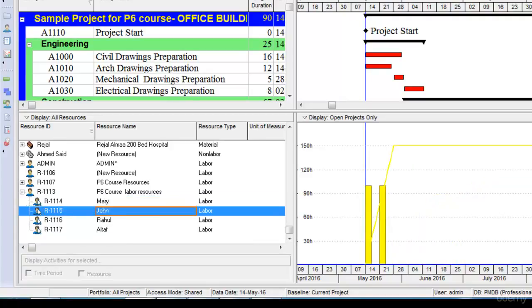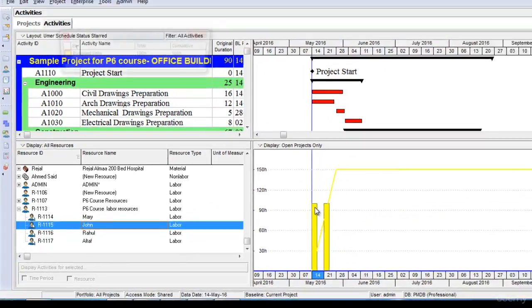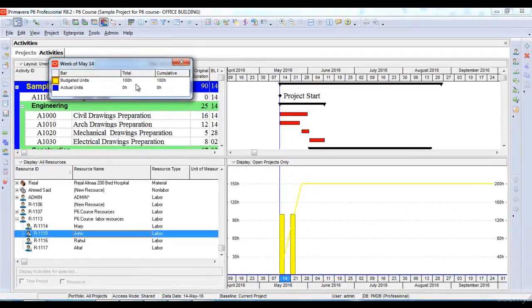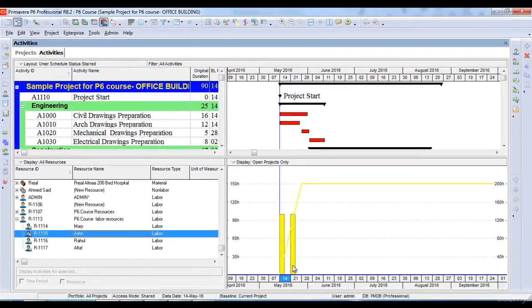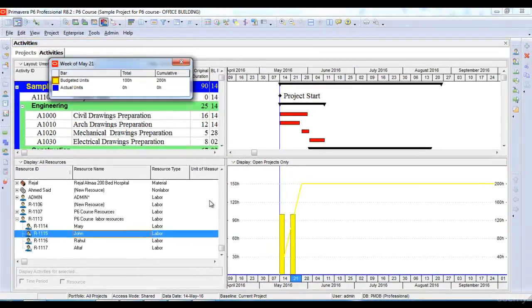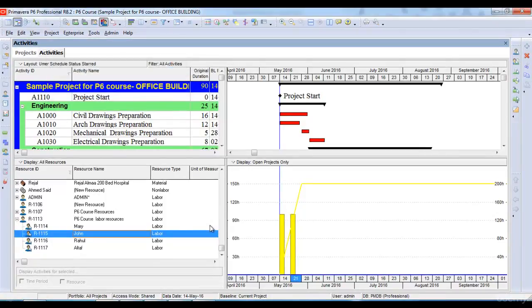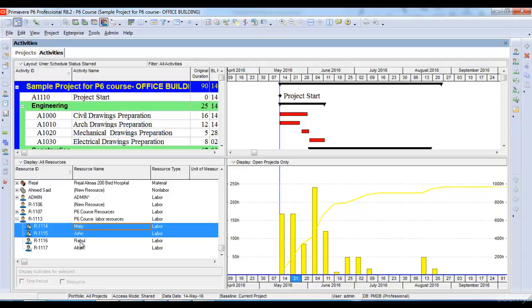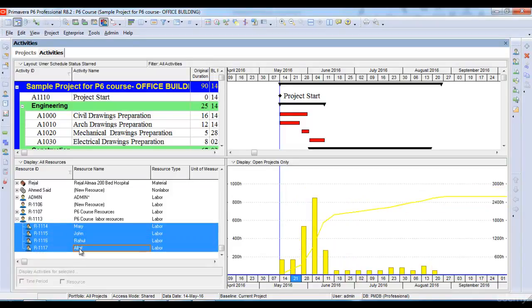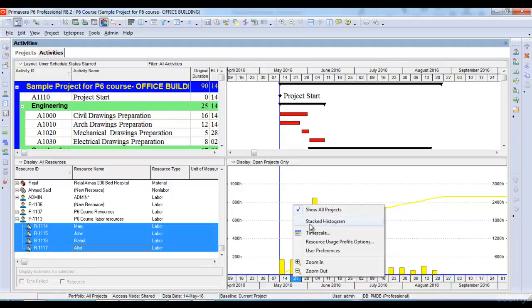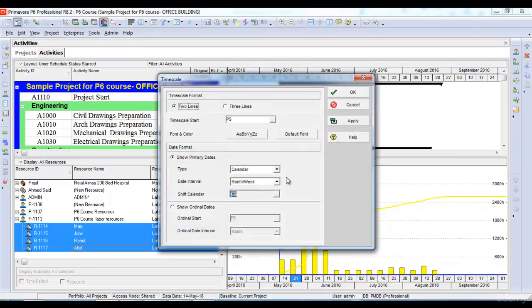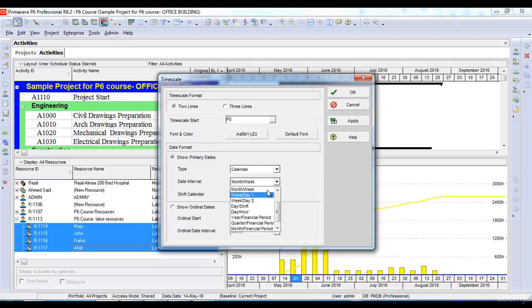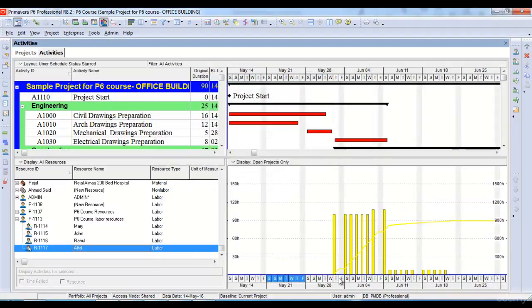It shows me that John has been assigned budgeted units of 100 in this week and a budgeted unit of 100 again in another week. If I want to see all of them, I'll just hold the control button and select all of them, and it shows me the total resource assignments. This graph is also known as resource histogram. If I change the time scale, I can make it on a daily basis. It can show me every day how many units and budgeted units of my resources are assigned to my project.